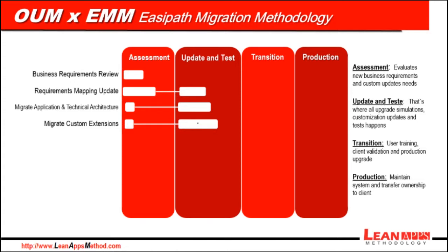Fifth process is data migration, whose goal is to move and test all required data from the current application instance to be operational after go live. Even though we mainly use Oracle core utility programs to convert all data, users still need to validate them along the tests. Next process is documentation. This process updates existing documentation created during the application implementation project and maintained during production. Another reason why IT governance is vital.